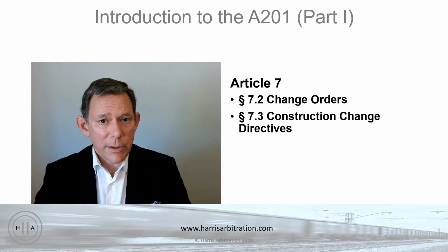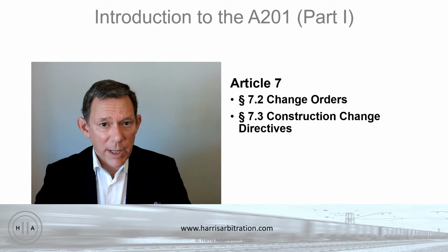And so what contractors are always concerned about is the impact of a change on their schedule, because as you saw in the A101, they have to stick to a particular schedule that will put them at substantial completion within a certain amount of time, or else face the possibility of liquidated damages for delay. So if there's a schedule impact, that needs to be taken into account, and if there's an out-of-pocket impact, going out and buying blue paint when the contractor's already paid for red paint, then that needs to be taken into account as well.